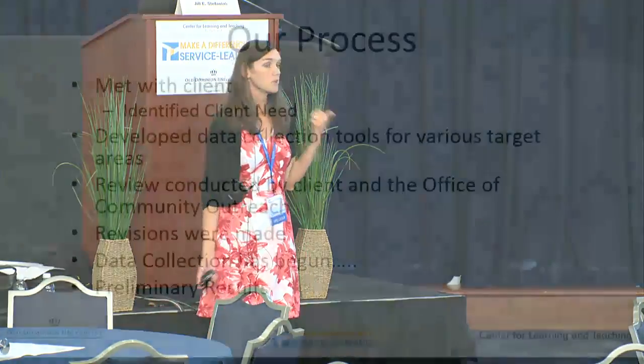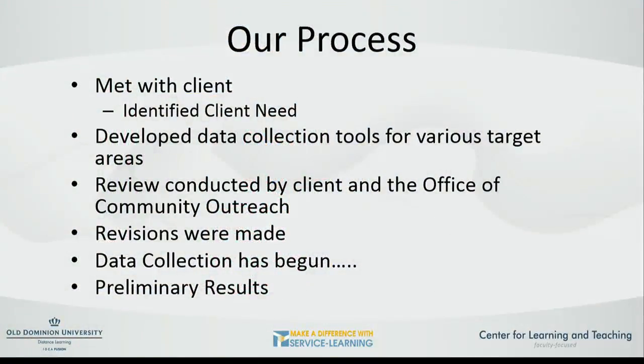And so what our process was, and this is just to give you an example of how you could implement service learning in your course: we met with our client, who was Emily Eddins. We developed data collection tools for various target areas. They were reviewed by the client in the Office of Community Outreach because we didn't want our students going out representing Old Dominion and collecting data without having the appropriate people approve what they were asking. Then we had revisions made based on the feedback we received from the Office of Community Outreach and Emily. We conducted data collection, and then we presented our preliminary results.